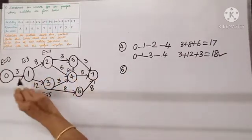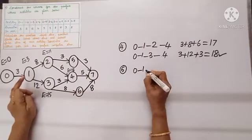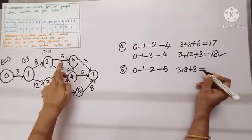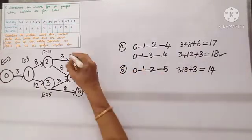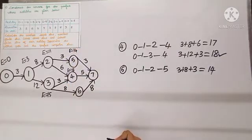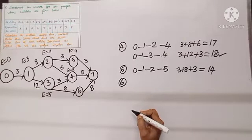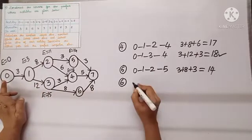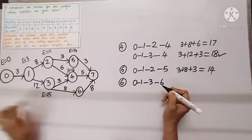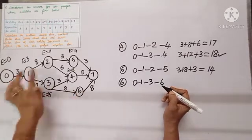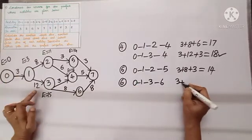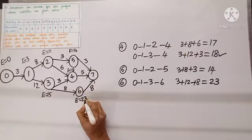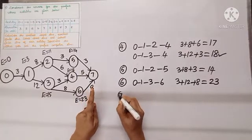Node five has only one arrow mark — one way: zero to one, one to two, two to five gives three plus eight plus three equals fourteen. So E at five is fourteen. Node six has only one way: zero to one, one to three, three to six gives three plus twelve plus eight equals twenty-three. So E at six is twenty-three.